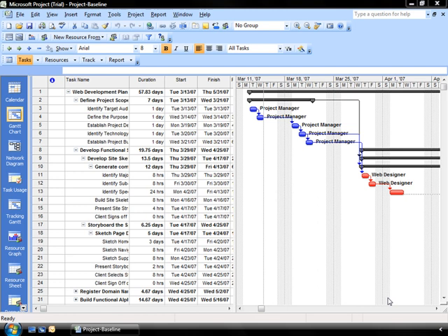The power of Project is when you can track actual events to the estimates you made at the beginning of the process. It's going to help you be proactive in your thinking so that you can anticipate challenges before they become big problems. It's also going to help improve your estimates for future projects because you can compare actuals against estimates when your project is done.